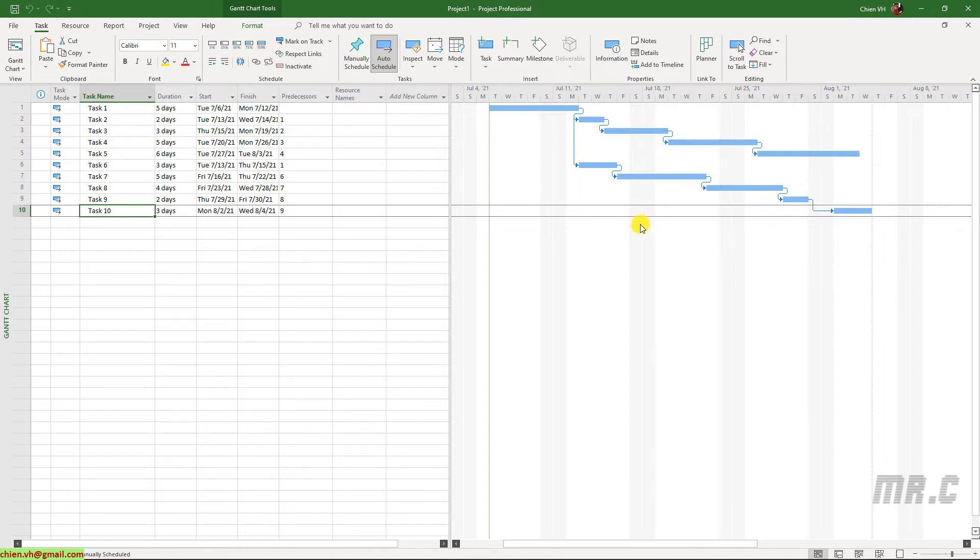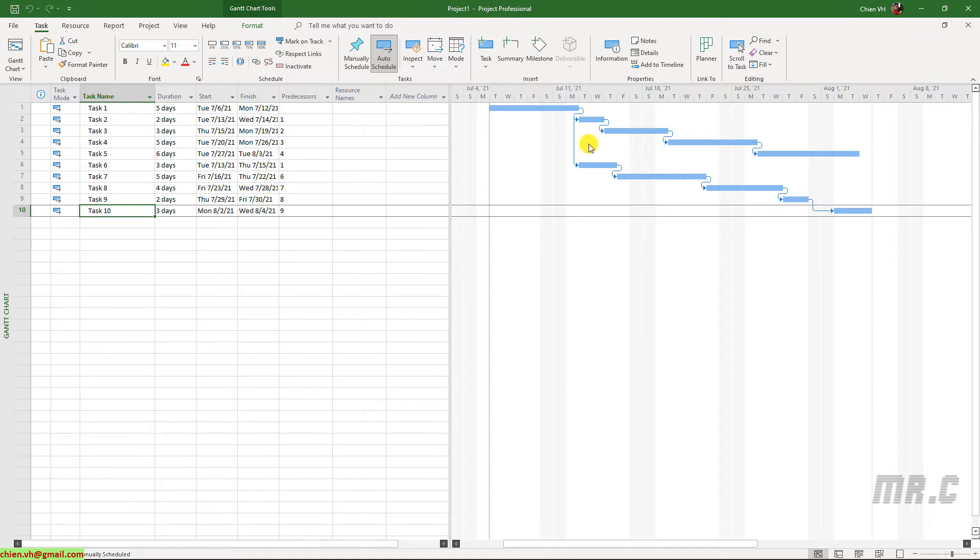In case, if you don't want to have the link relationship displaying on the Gantt chart, you can right-click on the Gantt chart, select Layout.